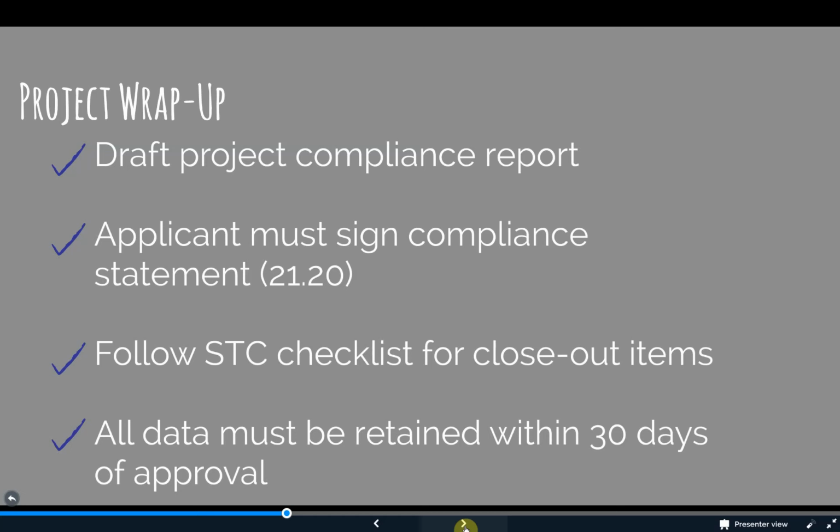This report includes a signature block above the compliance checklist for the applicant to sign. The reason this signature must be complete before the ODA can make a final approval is 14 CFR 21.20, which states, the applicant for a type certificate, including an amended or supplemental type certificate, must A.